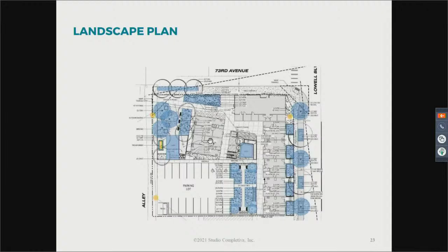Thank you, Gary. Heath Klein again. So yes, this project is required to place the overhead utilities underground. But that will essentially be from the Penguin building or their southern property line north. So they will be placing that. It will not underground all of the overhead utilities south of this property.